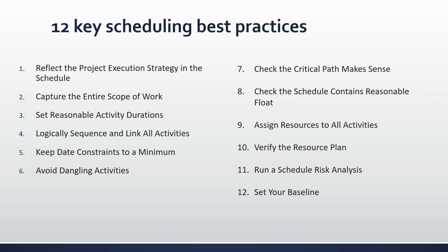Number 9, assign resources to all activities. Project schedules should reflect the resource needs to complete the project successfully. Remember that every activity in the schedule should be resource loaded except for milestones. Activities represent work that must be done to satisfy the project contract. This can't be done without consuming resources, so any activities without assigned resources shouldn't be in the schedule.